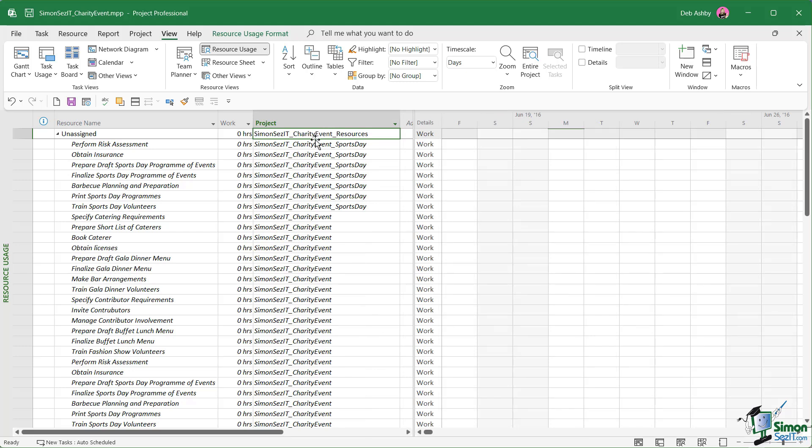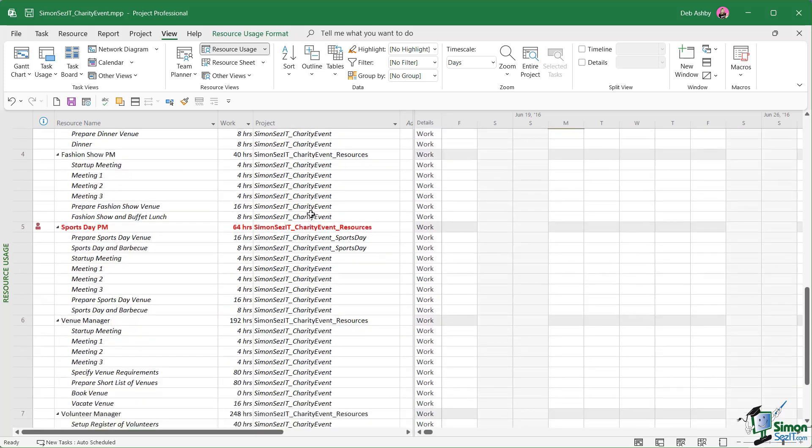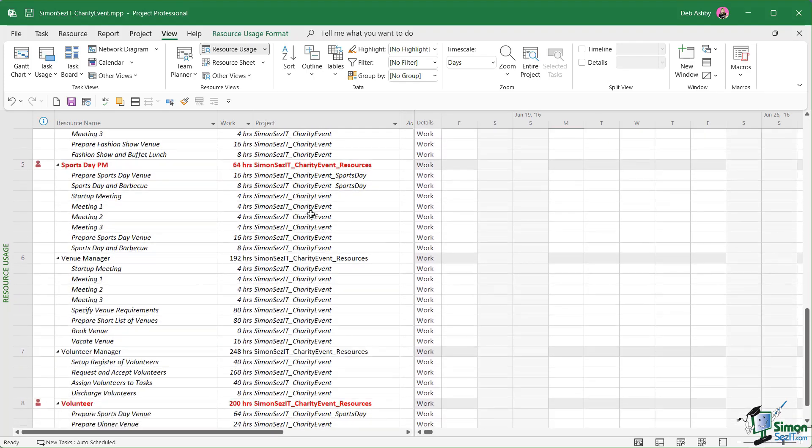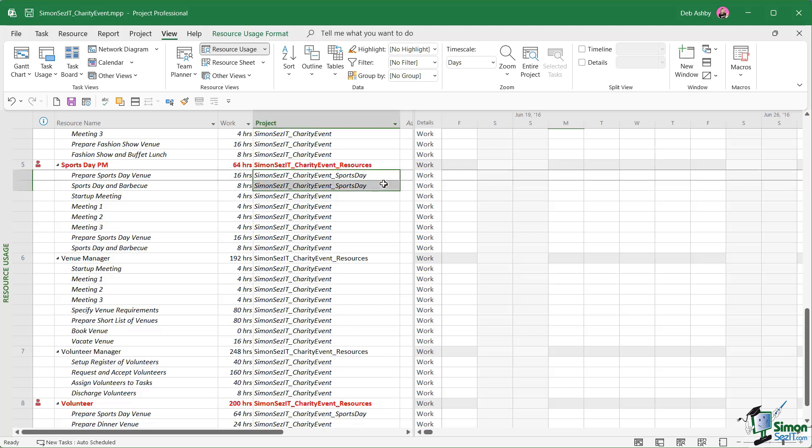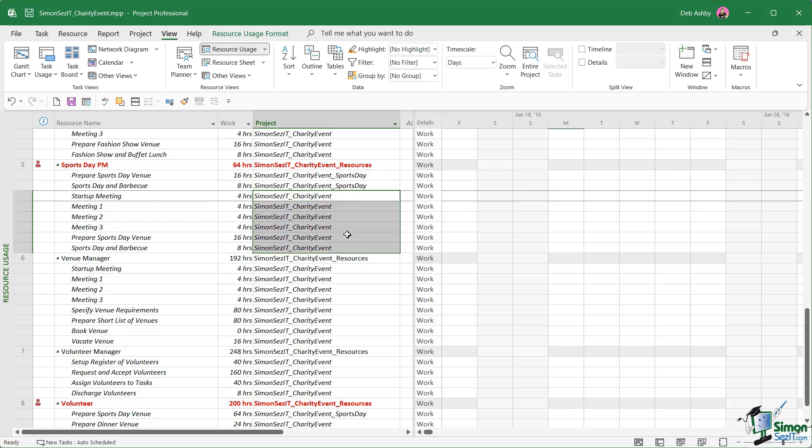If we widen this out, we can see at the top we have some unassigned resources, but we can also see the projects in this column where those resources exist. If we scroll down to the sports day section, I can see that the sports day PM, the sports day project manager, that resource is being used in both the sports day project file and also the original charity event file. So adding this project column into your resource usage sheet can be super helpful, particularly when you're trying to deal with over allocations and see which resources you have allocated to which projects.